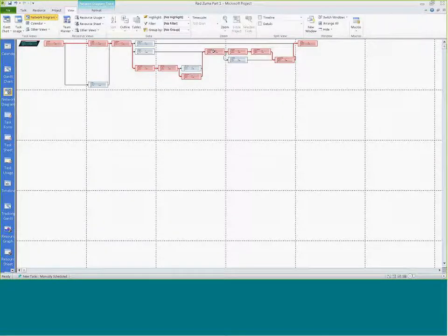It's a merge activity. It is critical. It feeds two others, and it has a higher ID number. It's 1.11, where product selection is only 1.4. So the further out into the project, the more sensitive they could be to change. We're past slack time, and that's the only reason. Anything up here could impact it further.